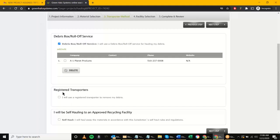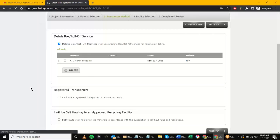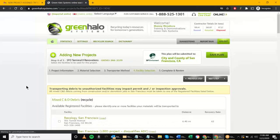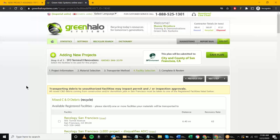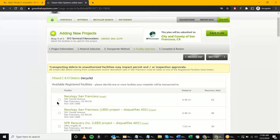I'll stick with A1 Planet Products and move on to the next step. This next step identifies where the materials are going to go. The contractor in this case might work with A1, who tells them the stuff is going to Recology. At this point it's just identifying which facility the materials are going to. You have to specify — for the construction debris it's going to Recology. If I try to go to the next step it will say I also need to specify where the concrete is going.